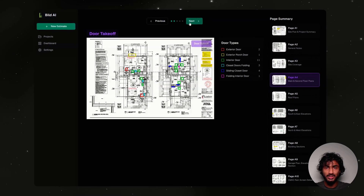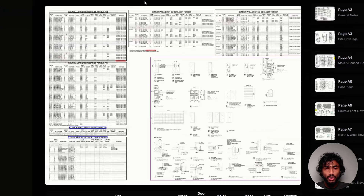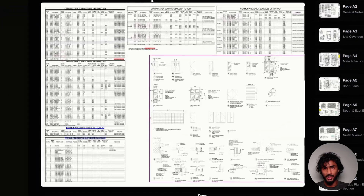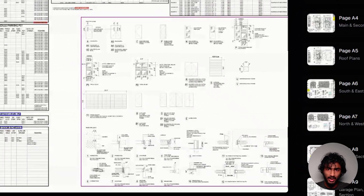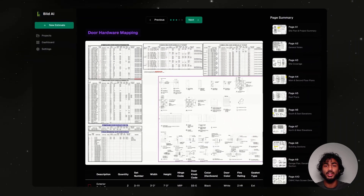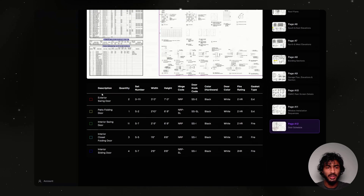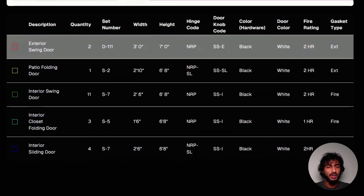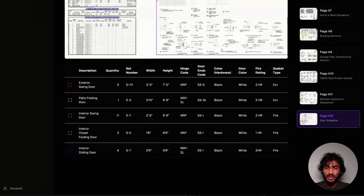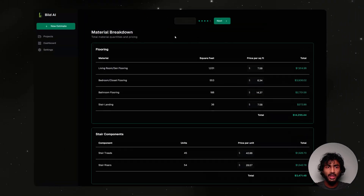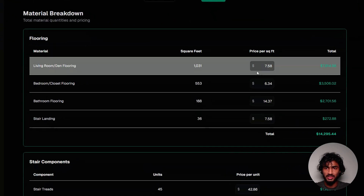Now that we have the count, we're not done yet. We have to pore over the blueprint, going over tables, notes, and diagrams to understand the hardware for the specific door. Luckily, Build AI knows exactly what to look for and figures out the set number and the hardware.